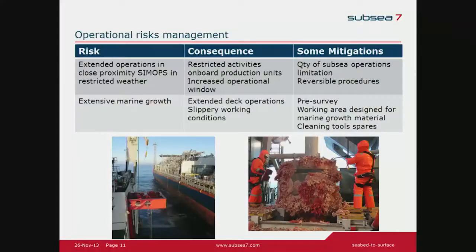Extensive marine growth. This is definitely happening when we recover a 15 years old product or 20 years old product. And the consequence of having this marine growth is, as you can see here, very heavy-duty manual operation to be done on deck, but also very wet and slippery conditions on board.